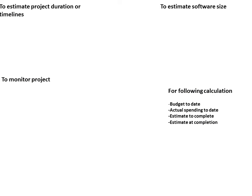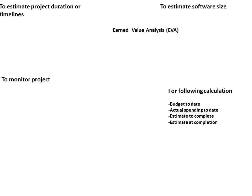Let us recap what we learned in the last slide. Earned Value Analysis — where does it belong? It should come when specific details with respect to budget to date, actual spending to date, estimate to complete, or estimated completion are given.